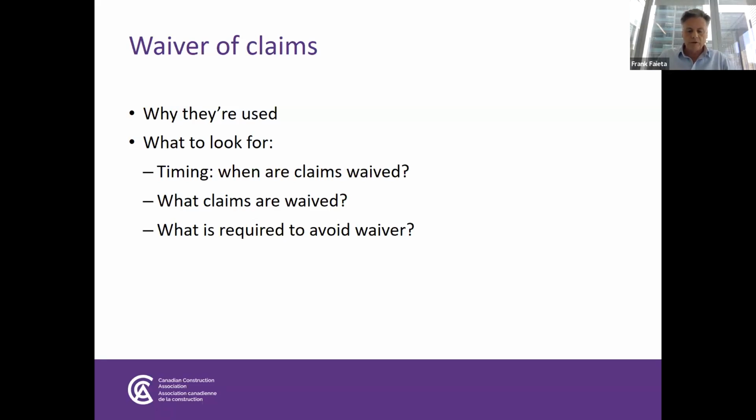So timely notice of issues, again, we're talking about notice, preserves your ability to be compensated for extras or for issues or damages or whatever might have happened in that contract that you may be looking for compensation for. And that works the other way too for any parties looking for compensation. All of this is anchored around the concept of ready for takeover. There are time limits around giving certain notices before ready for takeover, and once ready for takeover happens, the time limits change a little bit. You just have to read this. The instructions are pretty clear, there's just a lot of instructions.